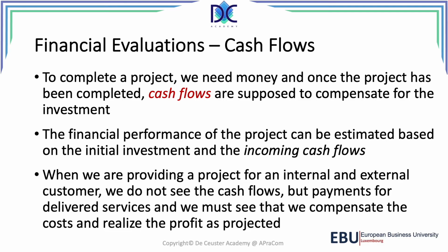We don't see once the product has been sold, it's gone, depending on the contract. Some contracts still have some service levels or service agreements, it depends. But basically our project is finished and we evaluate it like that. We don't have those cash flows at the end, but we may have prepayments, partial payments of the work done. What we have to evaluate is how efficient we are in completing the work. Because if we have problems executing some tasks, they take longer, it means that we are spending more money than originally planned and our profit level will go down. And that's not really good. We don't really want to have this.